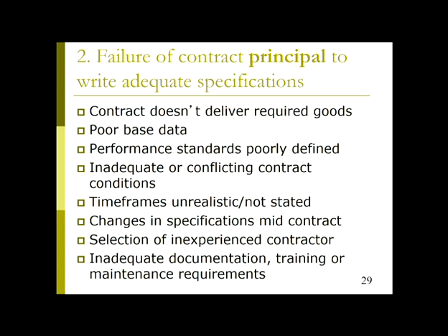And after about 6 months of operation, the sewage managers came back to the companies that had provided the pumps and the company that provided the lubrication and said, they're running hot. They shouldn't be. And so there was a big meeting, and everybody put their heads together, the contract managers, the providers of the pumps and the providers of the maintenance. The maintenance guys said, where's your maintenance schedule? Let's have a look at that. And they went, what maintenance schedule? And they sort of went, oh, that could be the problem.